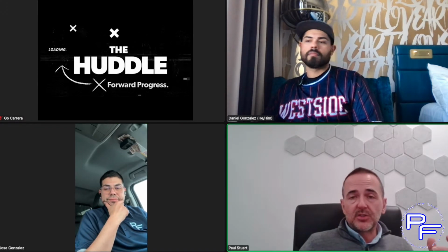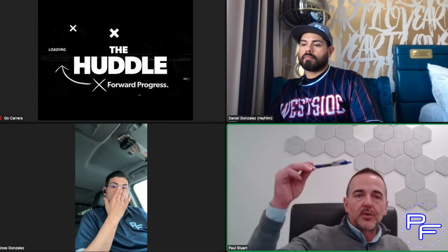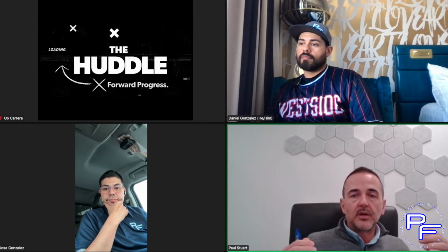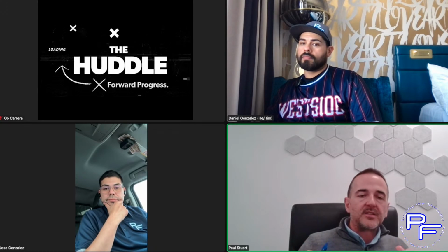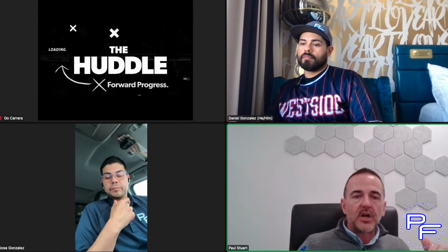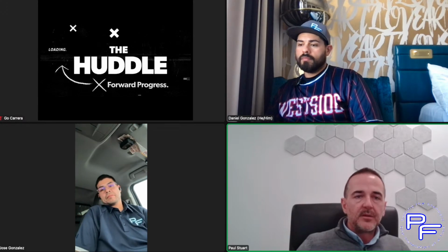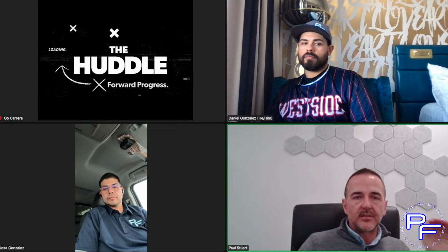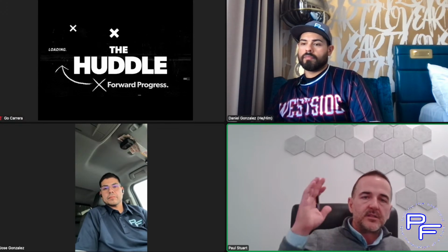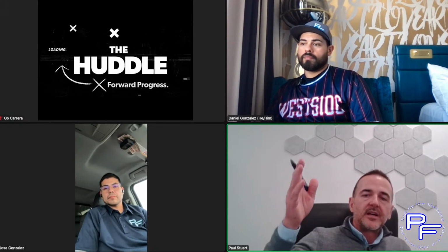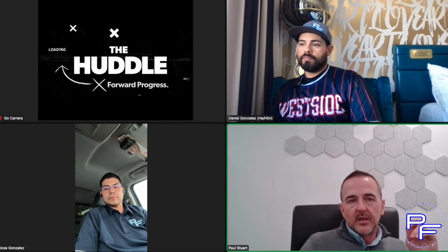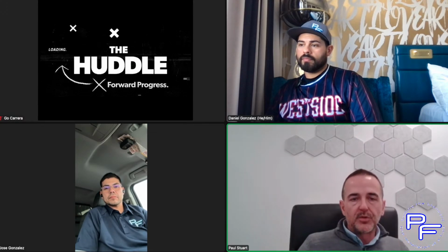So, the effort doesn't change. You need to make sure your margins are covering all your overhead costs, unless you get into estimating practices of figuring overhead and approximate hours of overhead and all this management fee and building that all out. We do not. We look at it like, this is our heavy costs. We're going to mark up this line item this much, this line item this much, and on through. And then we produce our bid off of that.